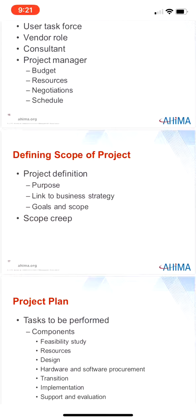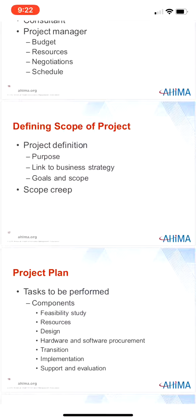The healthcare facility must define the scope of the project. The project definition is determined during planning to tell the healthcare facility exactly what it is trying to do with the information system and the expected outcomes. The healthcare facility must identify the purpose of the information system, how the system links to the business strategy, and the goals and scope for the project. Sometimes you end up with scope creep — this happens when items not included in the original scope are added after the project has begun. For example, if a project starts out to implement an EHR in a medical clinic and then a decision is made to add the EHR to the outpatient surgery area, that was not part of the original scope, requiring more time and more resources.